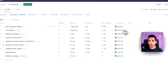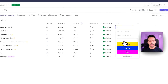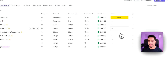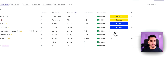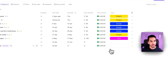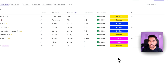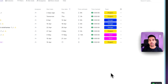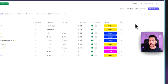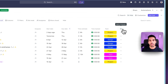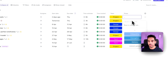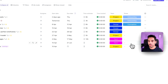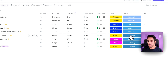I'm going to wrap my tasks so that I can assign each step to the right team. Get customer assets is done by the project manager, client brief, make the wireframes, validate design — then it's going to be tech. The weekly meetings are handled by the project team. We're now tracking on each task which team has to work on it. Next we want to track the project phase — the step we're at in the whole project. So we're going to add a second custom field called dropdown. We're going to add each step in the right phase: onboarding, conception, and client delivery.